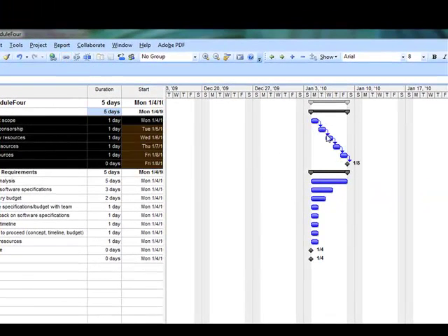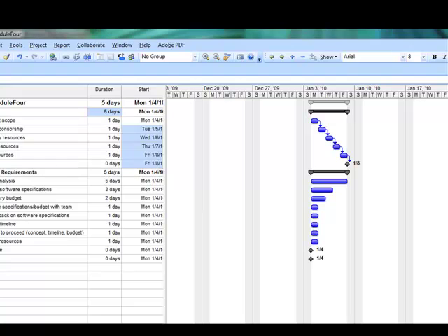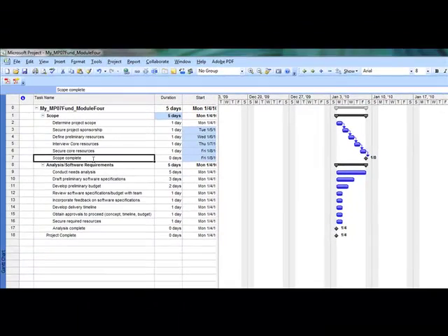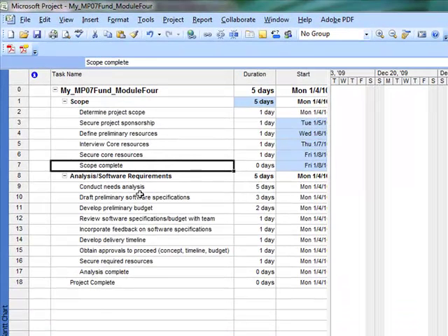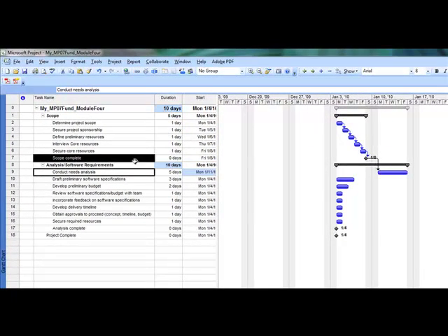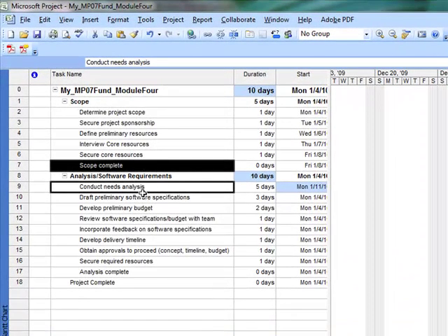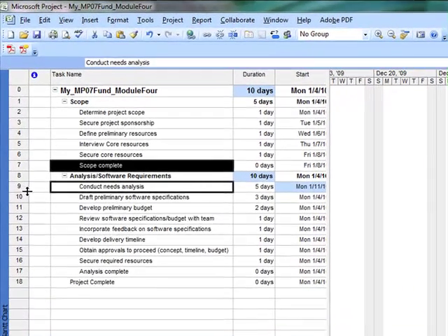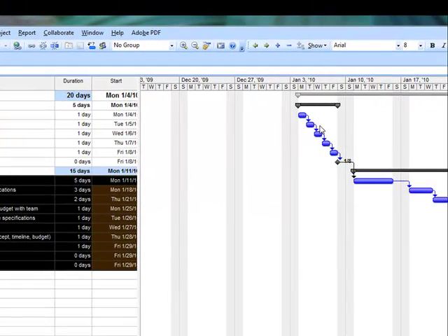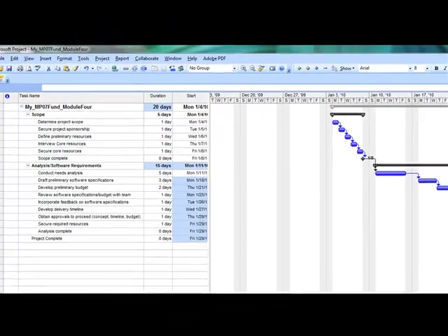And you'll notice what it does out here in the Gantt chart is it then creates these dependencies among the different tasks that we've been working with. In the next section, it's asking us to link non-adjacent tasks, which in this case is task number 7, and we want to hold down the Control key and click on task number 9 and do the same thing and create a dependency between these two tasks, between the milestone task and the first task of the next set of tasks underneath the summary. Okay, then let's go ahead and highlight 9 through 18, and we'll link the remaining set of tasks within the schedule. I'll go back up to Link Tasks, and I'll click on that, and you'll notice how it's created the dependencies among those other tasks.